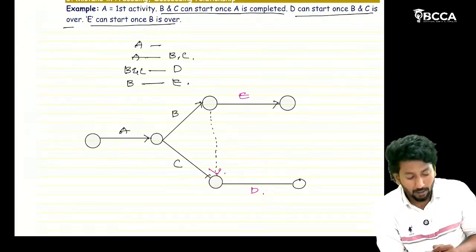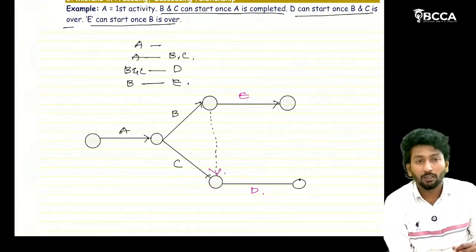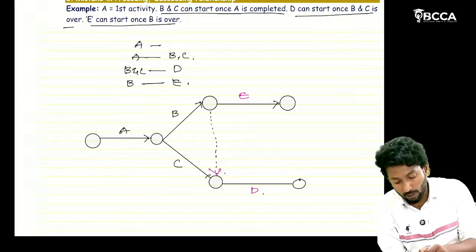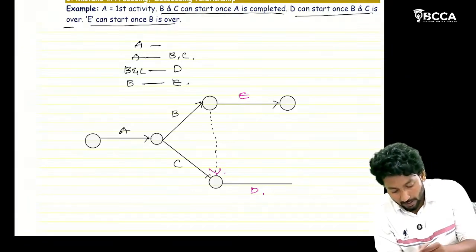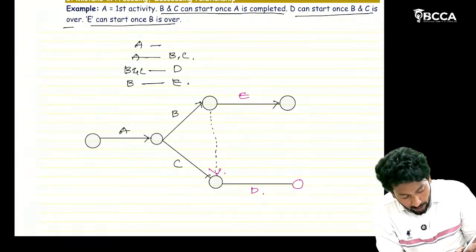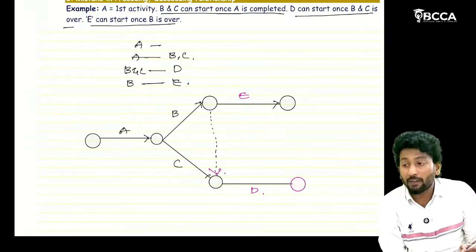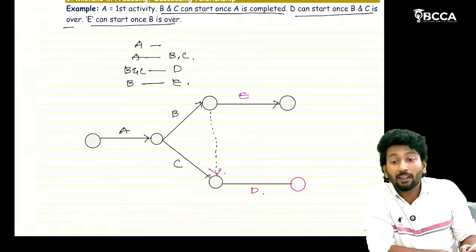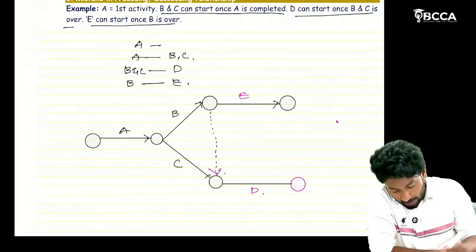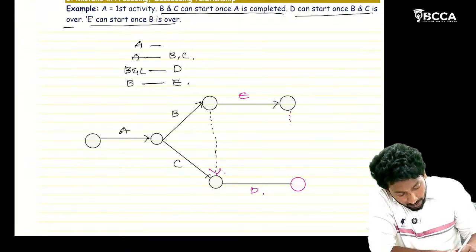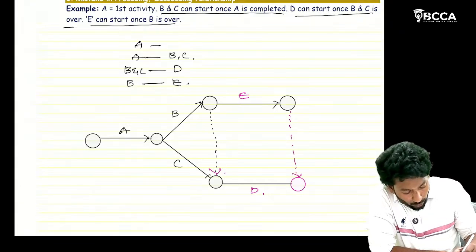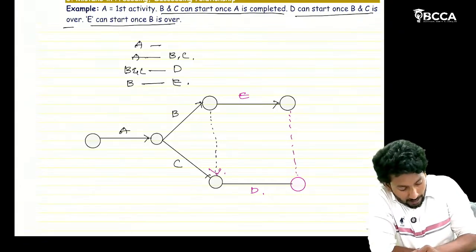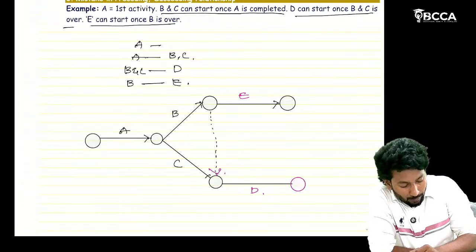Now tell me, sir, is this diagram correct? We have one more error here. What is that error? We have one start point, fine, but we are having two end points. What error is this? Dangling or hanging error. That's why, to avoid this error, take a dummy from here to here. You can resolve this error in multiple ways, sir.